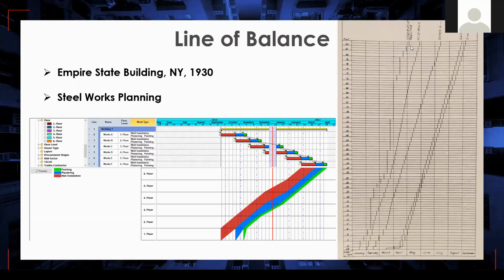Of course, in modern days the line of balance charts are not created manually, and we can automatically update and display the line of balance charts within our planning and scheduling specific software, Power Project. What we see here is a Gantt chart. We have 3 activity disciplines with codes. The brown, blue, and green ones are the wall, plaster, and paint activities. We are also able to track all these activity progress and productivity based on the floor information.